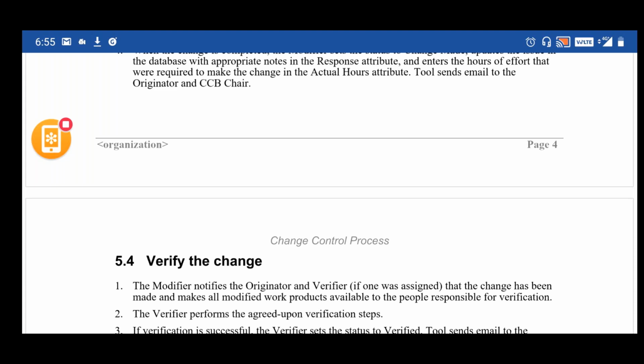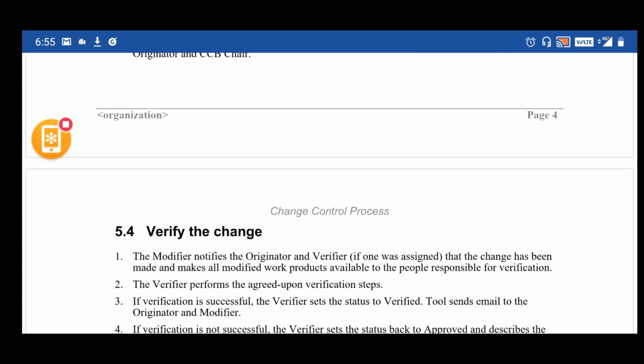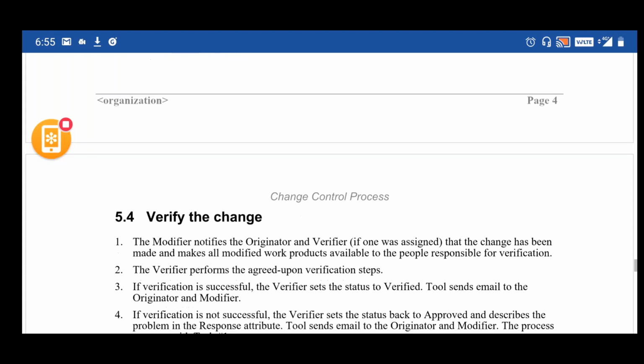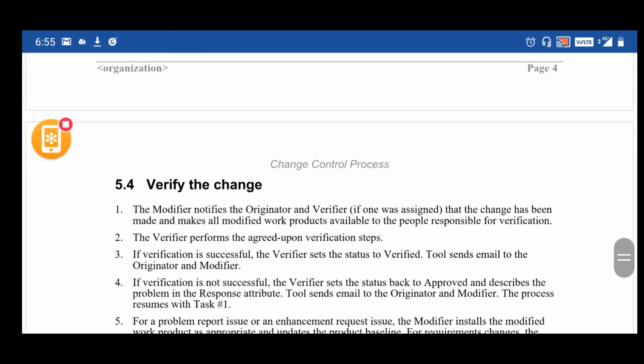Okay, it depends. Change is something where we are trying to modify an existing system, modify the requirements of an existing system, or enhance an existing system. If your enhancement is related to one particular feature, or maybe one or two features, you will probably define each one as a separate change, like CR1, CR2, change request 1 and 2, and we'll go through the approval process and implement them separately.